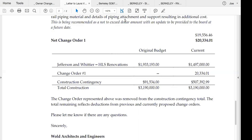Oh, a quick update on the settlement at Riley North Lake. Based on the information we're getting from the testing company, there's been some very modest movement there. We've been talking as a team with the Gilbane team and our owner administrators that it probably will make sense to go in and level those floors this summer. We may also look at doing some shoring up with the floor slab, but we don't feel that the foundations are the culprit at this point in time. That might be something you might have to tackle down in the future.